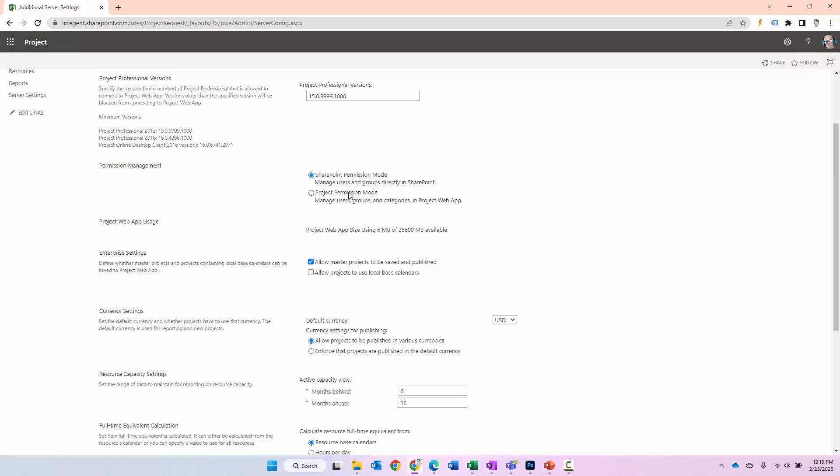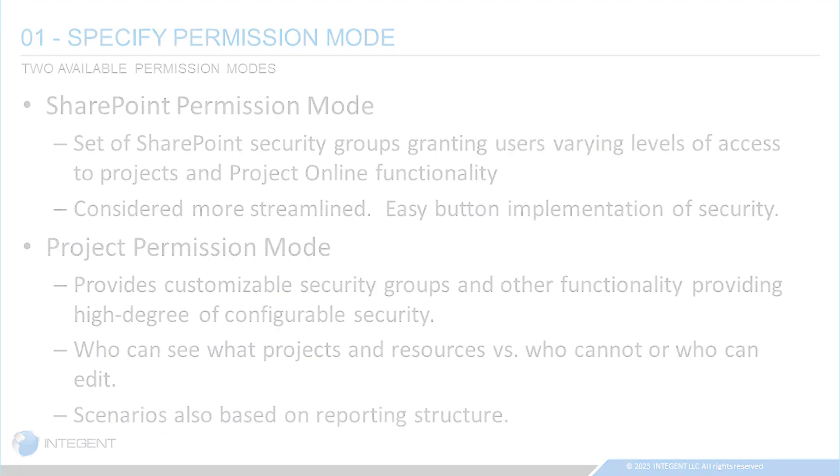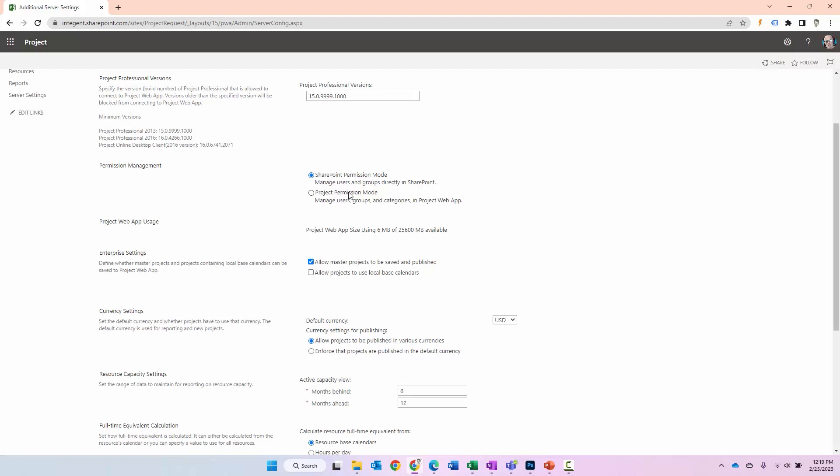By default, Project Online is going to be set up in SharePoint permission mode. In this mode, there are a set of SharePoint security groups granting users varying levels of access to projects and Project Online functionality. This mode, SharePoint permission mode, is considered more streamlined than project permission mode. I occasionally call it the easy button implementation of security because again, you just add people to the groups. You can't change the permissions at all. You don't have to think about the permissions at all other than which group to add people to. What I mean by that is you can't tweak the permissions within the groups. You can't add additional groups. You just what you have is what you use.